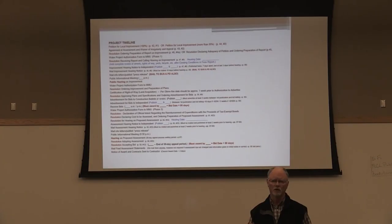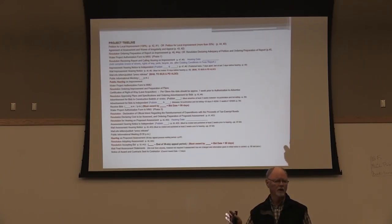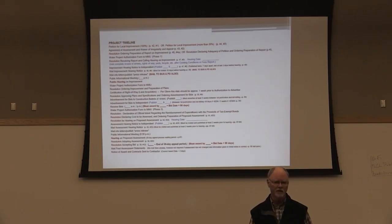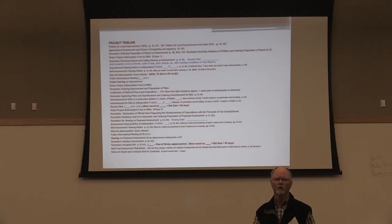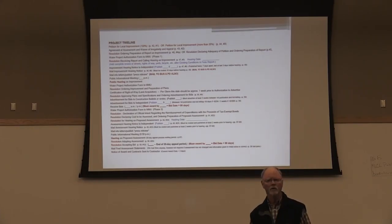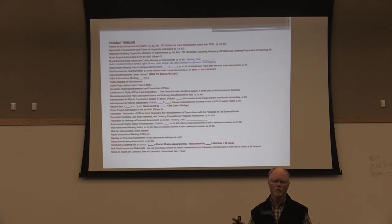The separation of project costs is divided into several different funds and accounts. There could be participation from Marshall Municipal Utilities, from the wastewater department for sewer lines, from the stormwater department for storm sewer replacement and repair, and what's called ad valorem — the amount committed by the City Council out of general taxation. Then there are the special assessment amounts, which are just a portion of the project cost, divided according to a special assessment policy.